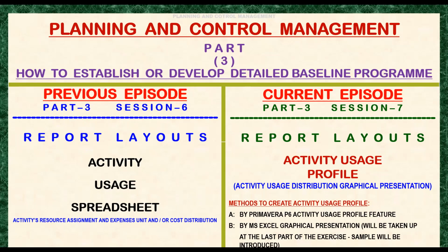Let me show here where we can add and define resource curves for selection in assigning into existing resource assignments if we wish to. But in the case of our project, we'll decide not to assign a resource curve. That means resource units and cost will be distributed evenly into the activity unless we assign or specify other curves from the predefined curves.